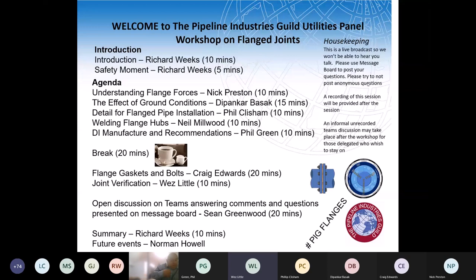And I think it's one of the areas to really review: once you've provided people with the training, it's looking at your supply chain and understanding how you're going to physically make that connection, and having a bit of a dry run of how it's going to work. Because Craig and I know ourselves, there's anything from even 4-inch diameter valve stacks where you just can't get a torque wrench in. And if you can't, you end up tightening from the bolt side, don't you, Craig? It's a challenge, and then you're not giving the right load. That's very difficult. Absolutely, yes.